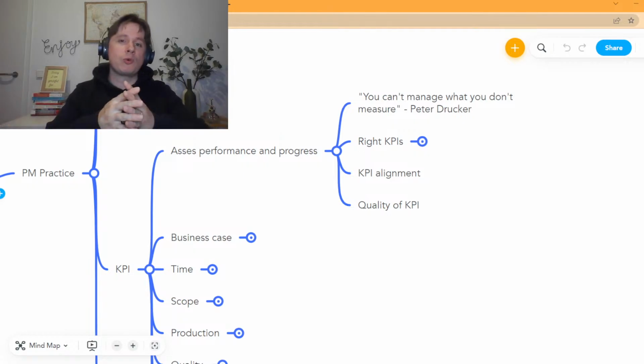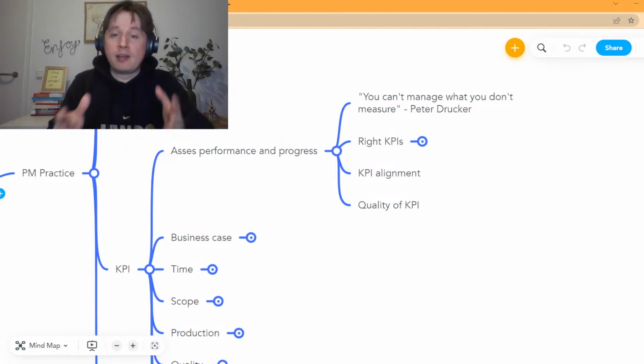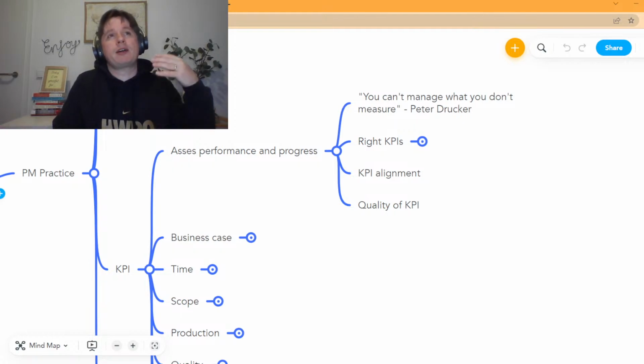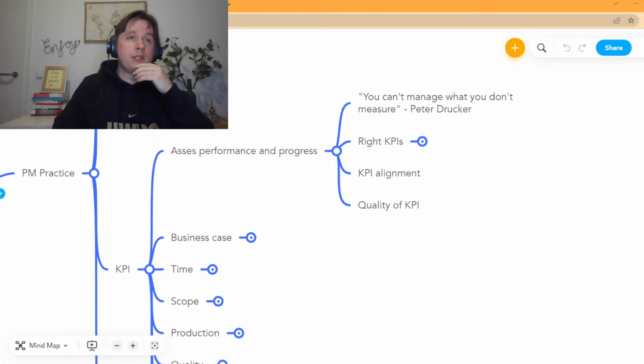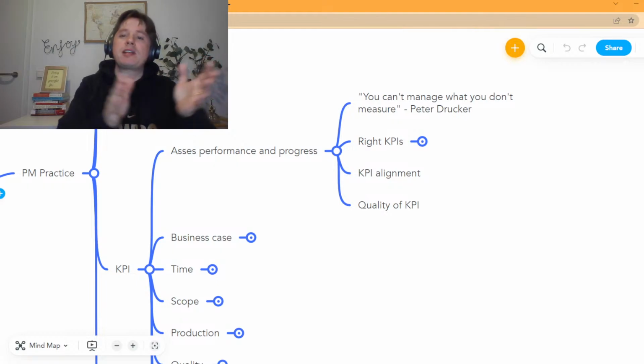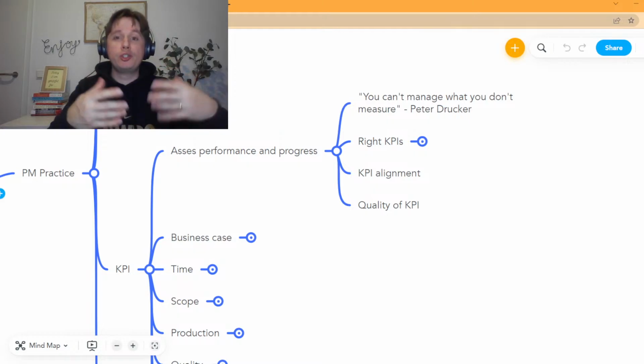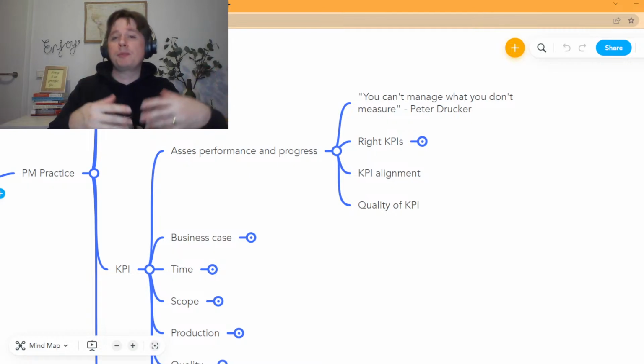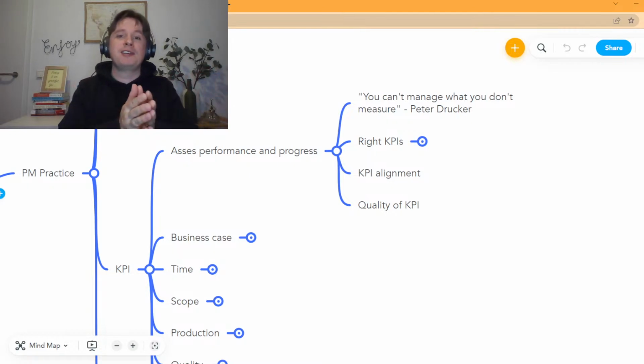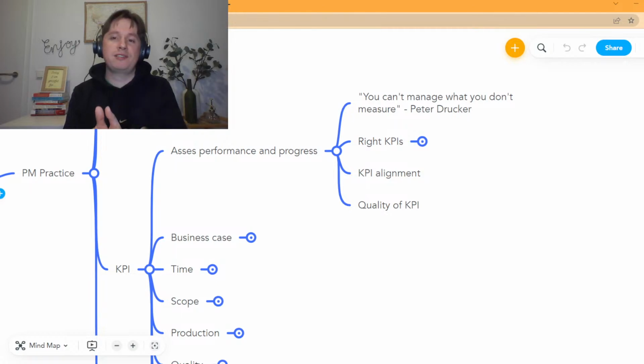And this is just one example. So KPI alignment is quite important here. Of course, I made a parallel with traveling, but I can tell you also in the past, I worked in a company, this was energy construction projects, where the design engineers' KPIs were completely misaligned from the project. Their KPI was the number of drawings issued, which if you think about that, you say, okay, but that's not bad. Yes, but because of their KPI, all the designers, or their manager, were pushing them to issue drawings. And in the end, for the construction, I could use only released drawings.